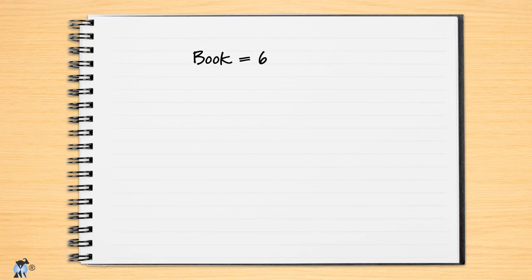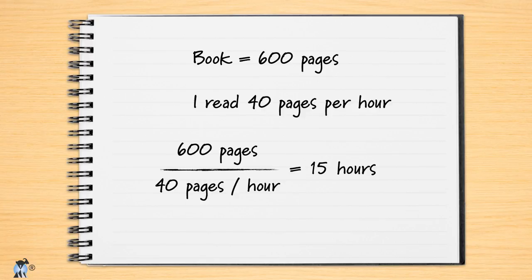Another technique you may have used is to first think about the size of the work, estimate your pace through the work, and then divide to come up with an estimate of the duration. For Harry Potter, perhaps you estimated the size of the book at 600 pages, then estimated that you read one page every minute and a half — that's 40 pages per hour. Dividing 600 pages by 40 pages per hour gives an estimate of 15 hours. You may have done something similar for driving, by estimating how many miles or kilometers away your destination was and dividing by an estimated speed per hour. In the next video, we will turn what we just learned into one of the most valuable principles of Agile Estimating.